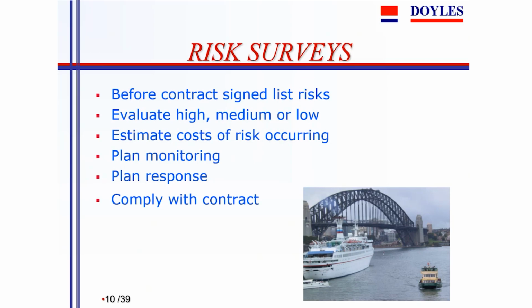There's a problem of instability of the walls, they might seek to fall in. And there's the concern over neighbours and the impact it will have on neighbours if there's any settlement of the surrounding sites. So one should, before one starts off, list the risks, rank them as high, medium or low.